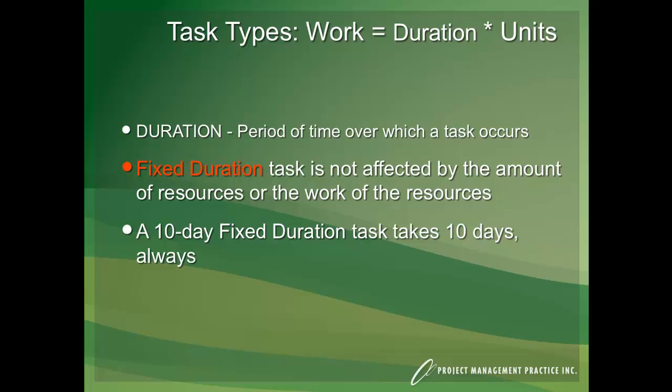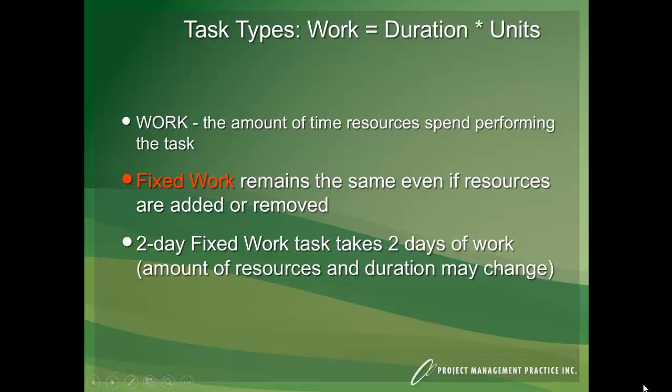On the other hand, you can choose effort-based scheduling, and effort-based scheduling is all about really estimating your effort and having the duration change based on the resources that you assign. So think about painting a room. Maybe you hired me to paint your office, and I come in and I say it's going to take me 10 days to paint your office, and I charge $100 a day, therefore it's going to cost you $1,000. And you go, Robert, I don't have enough time to wait 10 days. I need to have this done sooner. I don't mind paying you the $1,000, but is there any way you can shrink the duration?